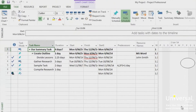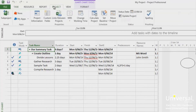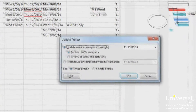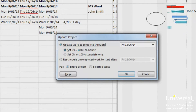There are other tools you can use to enter and track progress in Project 2013 aside from the ones we have just talked about. You can mark all tasks complete up to a specified status date by going to the Project tab and then clicking on Update Project. When you click on that button, you will see a dialogue box. You can select the options you want and then click OK, or otherwise click Cancel.